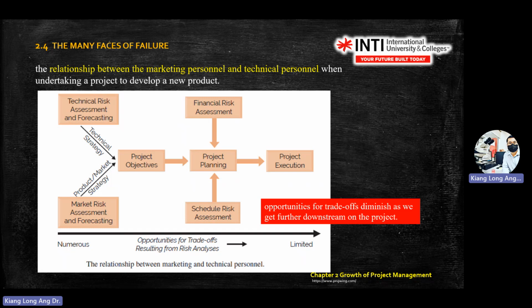Okay, what I need to highlight here is the opportunity for trade-off. Trade-off means changes, right? As you go deeper into the project, the opportunity to do changes is very small, right? Because if you make changes after you have decided everything, you have to go back to the drawing board, and then more cost is involved.